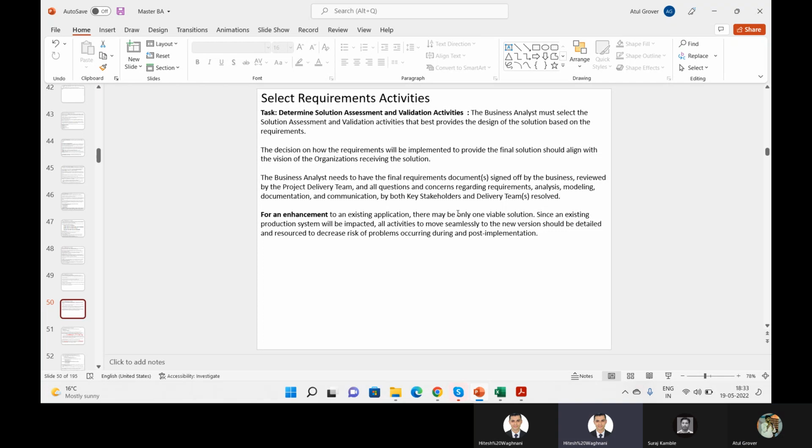And you just mentioned that if the response does not arrive in 7 days, it is assumed as approved. Do we have that clause before we sign? Yes, we have, right? In these activities, you have to do it. Okay. Fantastic. That SRS should be signed off by the 7th day or by every Thursday 5 PM. If not, we can go ahead with the assumption that it has been approved.